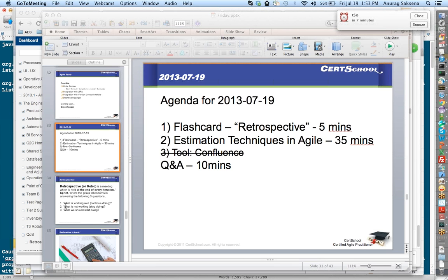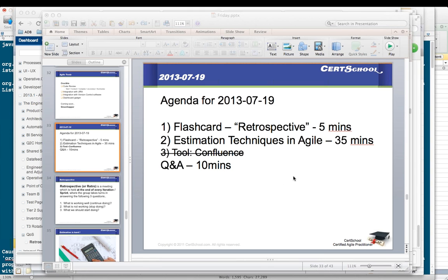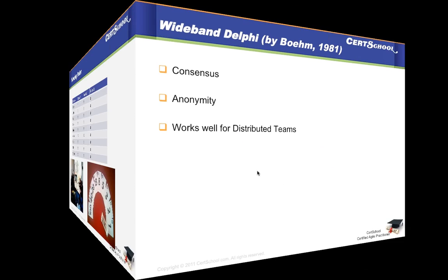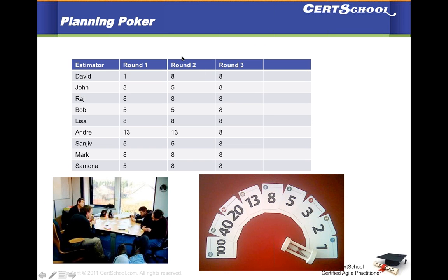The other is that you're using Fibonacci, and planning poker cards themselves are always built on Fibonacci. Like what I was showing you, I can go back to that slide. Planning poker cards are 1, 2, 3, 5, 8, 13, 20, 40, and 100. So you are using a combination, which is a very good thing.